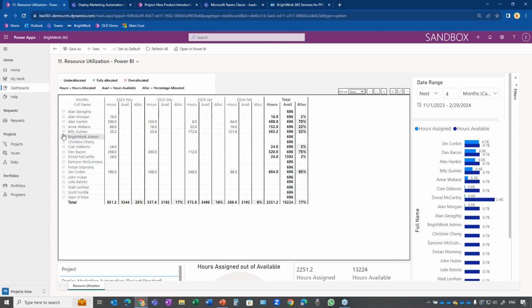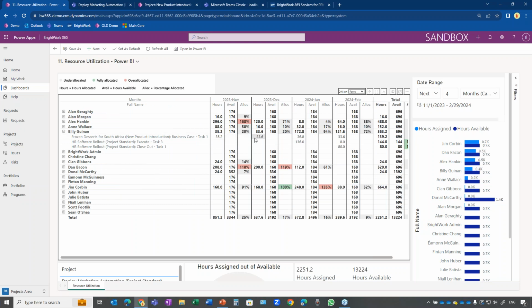then we see that if we look at this particular task, it's about 36 hours per month, which is about 20% of a person working a regular 5-day working week and so on. So all that is taken into account.